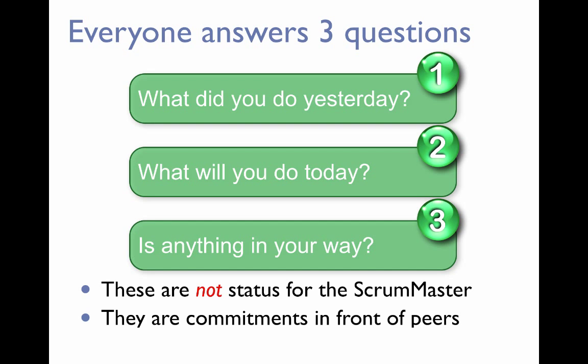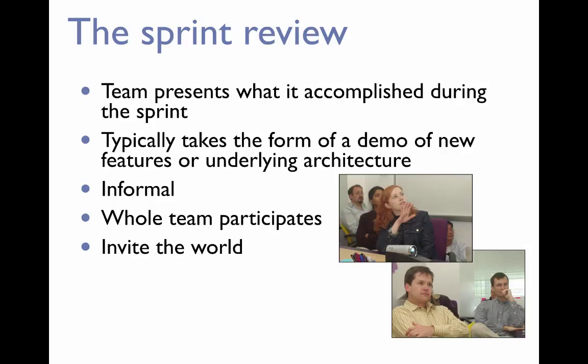Then the third regular ceremony is the sprint review. Sprint review basically means at the end of the sprint, right, you put everything together, you roll it into a playable piece of game, and then in that review you present out to the world what you accomplished during the sprint. You demo your features. It's very informal, so there's no formal presentation you have to do. You just have to show it off so people can interact with it, and give you feedback on what you're doing.